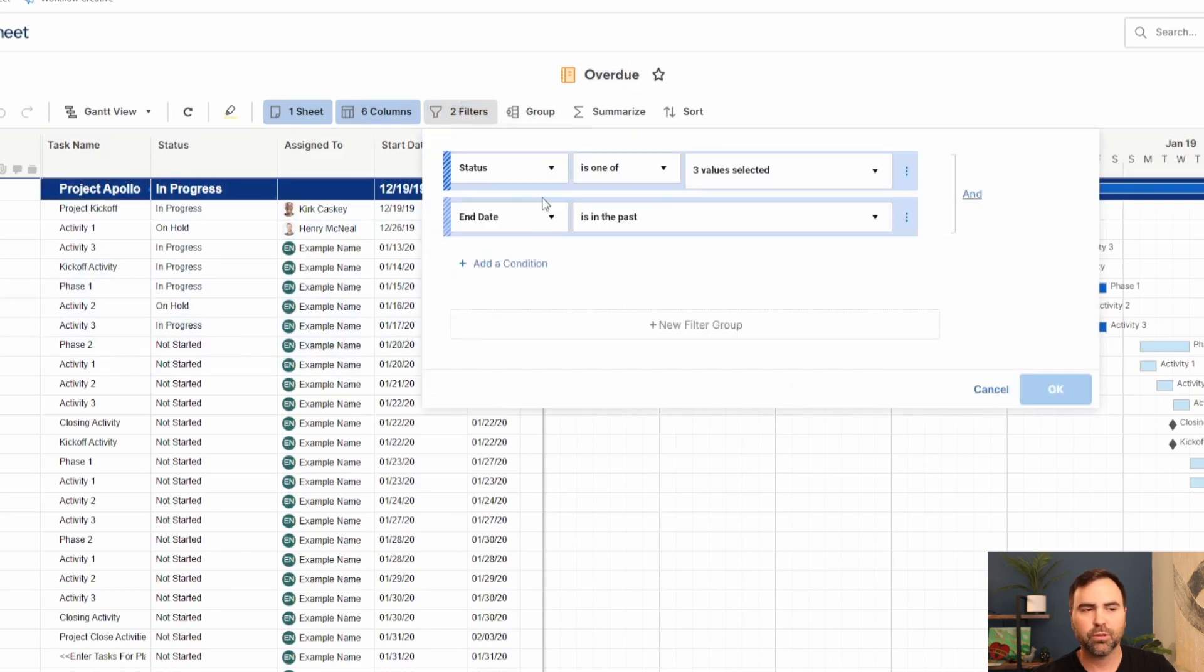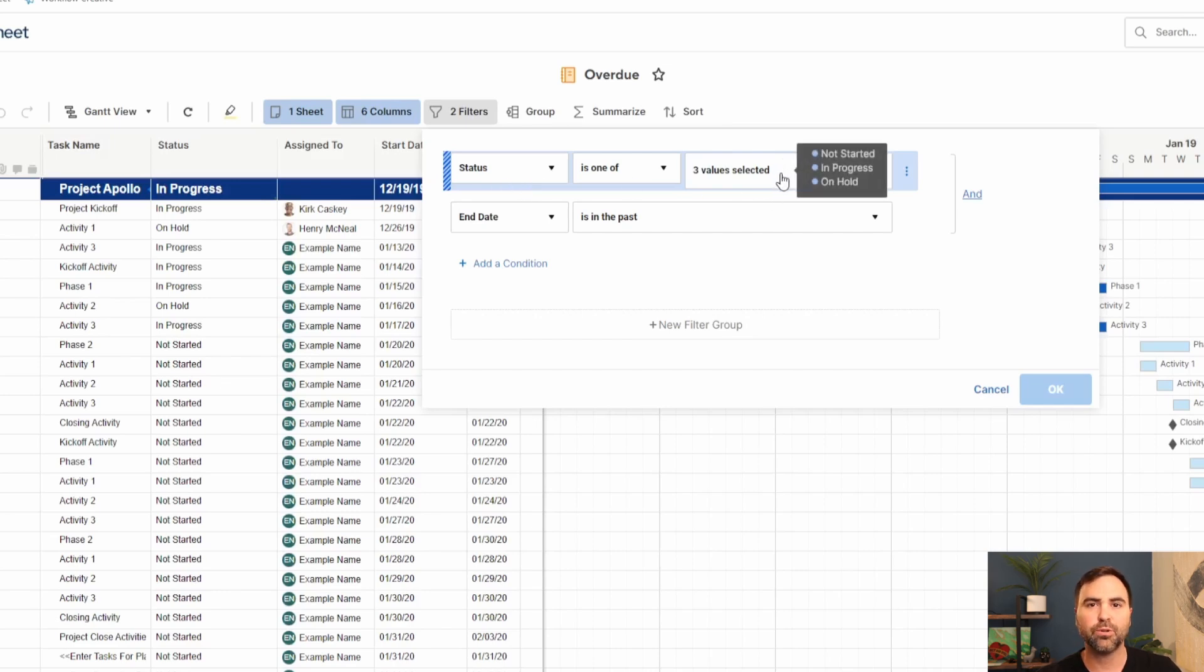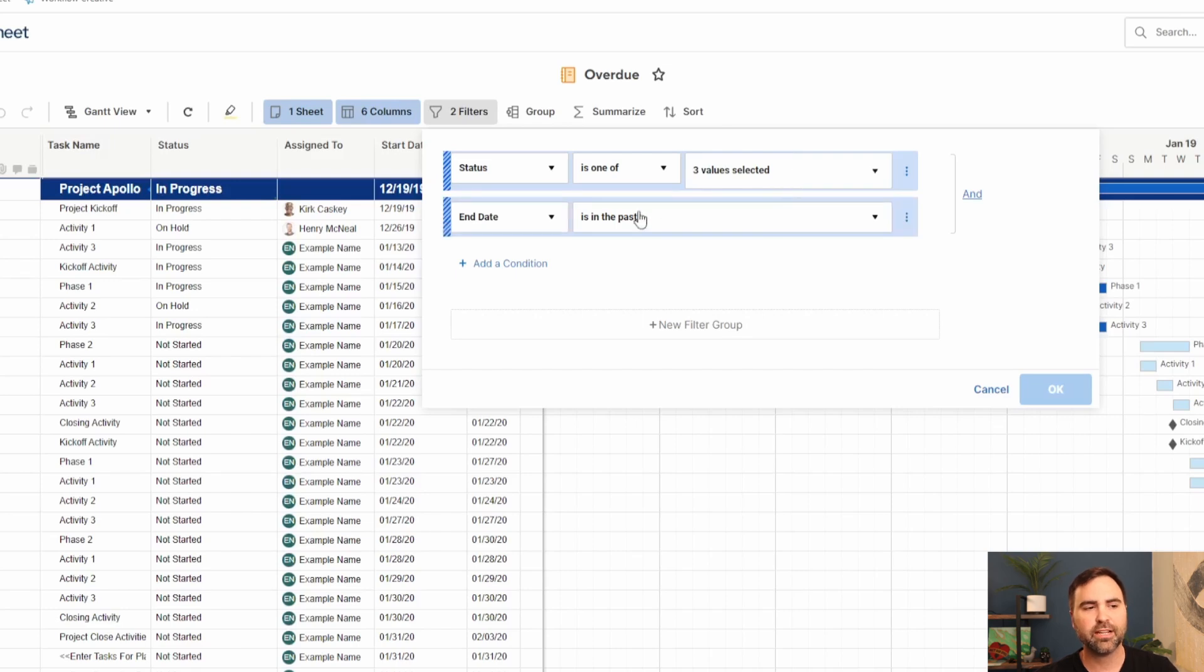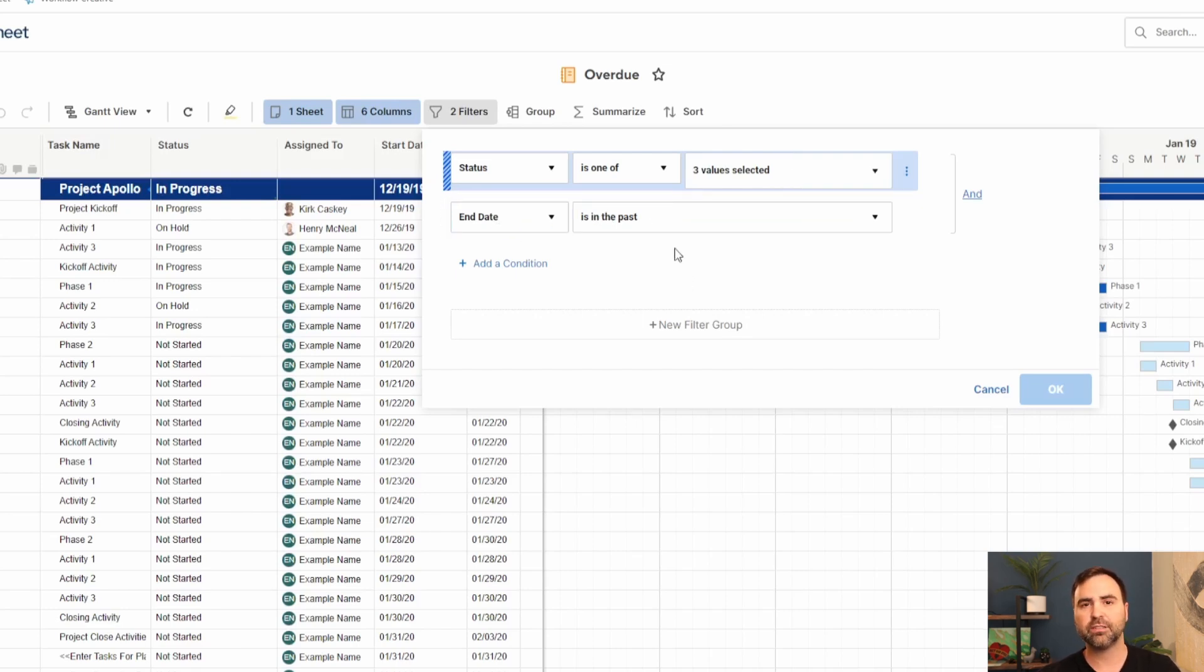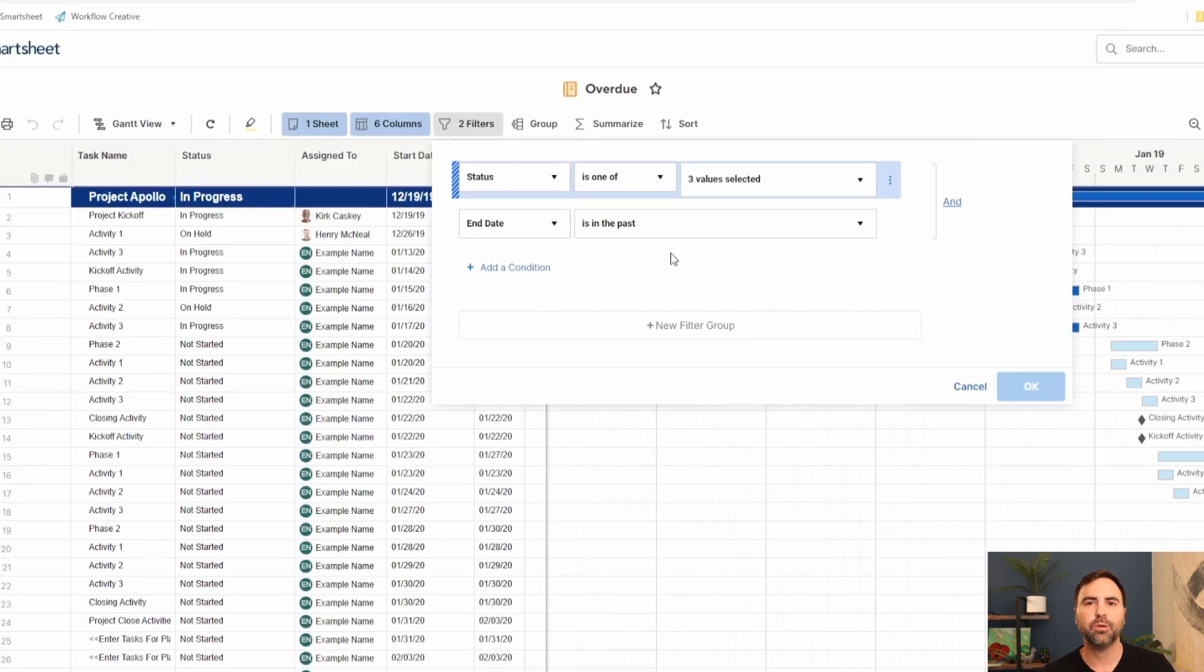This report has two filters on it. It's our overdue report. The first thing that it's going to filter out is any task with the status of not started, in progress, or on hold. And those tasks must also meet the criteria of having an end date in the past. So in other words, any task that should have started but hasn't will show up on our overdue report.